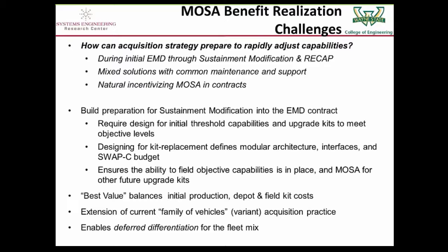That's not just modularity in terms of the organization and the packaging and function, but it's also a modularity that's tied to the order of assembly and the order of integration, so that the order of activity is another basis that we might want to look at when we think about what are the dimensions of the system that are going to be used as the basis for system decomposition.